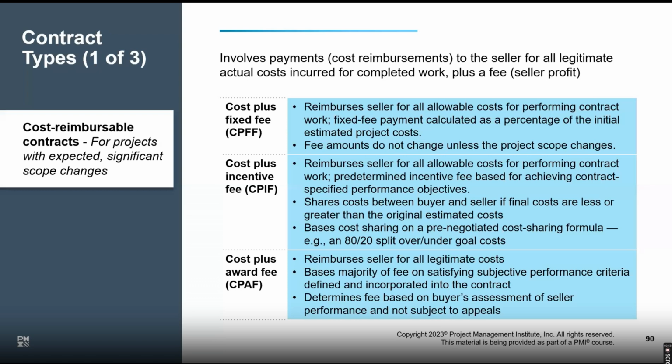Second one is the incentive one. Third one is, well, go. They decide: if they are happy, they will pay you; if they're not happy, they don't pay you. Hence, not in the end. They are more agile. These are predictive ones, and more will come. Let's look at the next slide. So please remember, these are all CCC. That means you pay first as a vendor, then get the money recovered. That's not earning. Earning is the fixed fee, incentive, and the award fee.